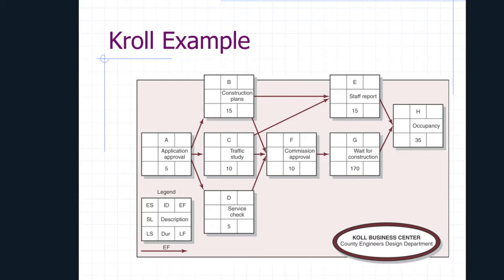So if we look at that example again, you can see now what's happened is that box has no longer just got A and then a piece of text to describe it. What it's now got is it's been partitioned into a series of smaller boxes. Now the identifier always goes at the top in the middle. So we've got the A, B, C, D all the way through. Top in the middle, that's the ID.